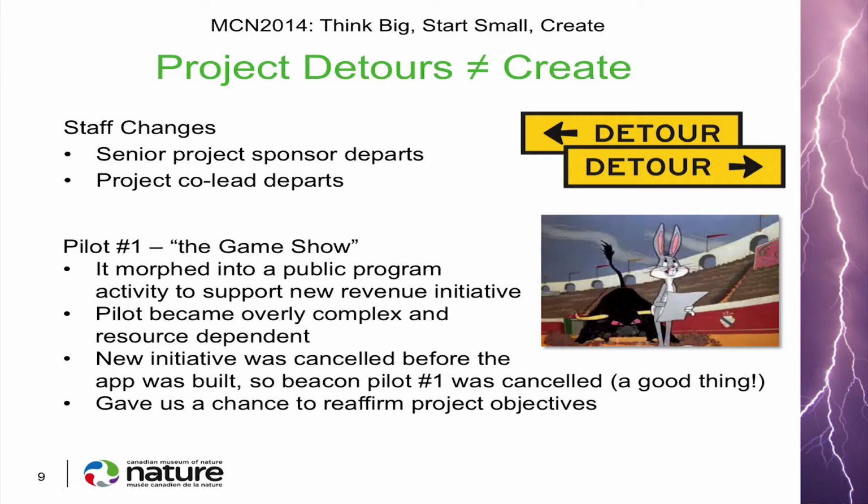Then we had some challenges that led to some delays in the project. The most significant was that our senior project sponsor, who was really supportive of the project and from where the budget came, left the museum prior to the project kickoff. In addition, my project co-lead in our education department also left the museum at the beginning of the project. So I spent quite a bit of time looking for support for the project and finding new staff to participate.